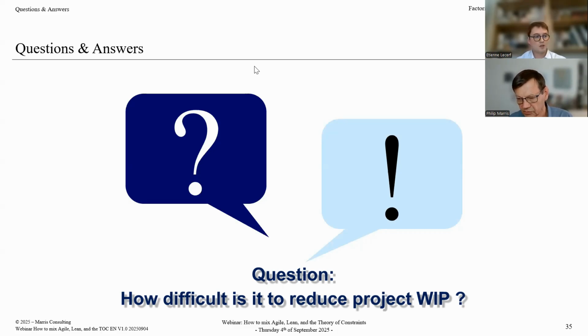And you need to be quite strong to explain to the customers your methodology and why at some point they will have to queue. And one of the tricks is to take advantage of this waiting time to ask the customer to prepare what he has to prepare, because usually he has to give you some inputs. For example, data. If it's special machinery, you need clear requirements, data, you need plans about where the machines will be installed, this kind of stuff.